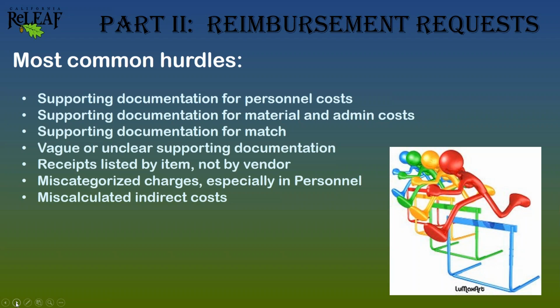Personnel charges are personnel charges, and that includes contractors. So if you had augering done by a contractor, that is a personnel cost. Please don't put that under equipment.